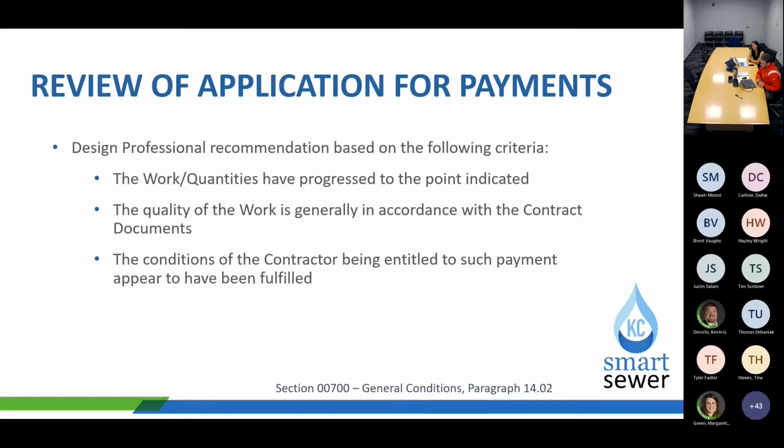The contractor is entitled to the payment that they're invoicing. So let's say, for instance, that they're billing for a bunch of CIPP or trenchless rehab. Just make sure that you've received any post CCTV and reviewed it before they're billing for these items.